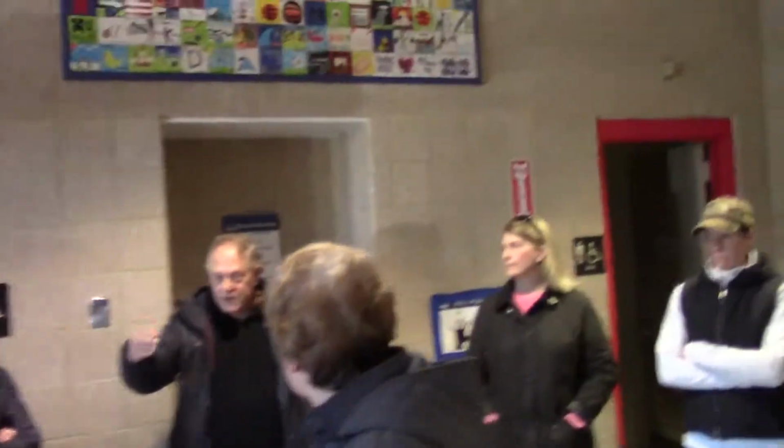10.38 is the central office roof because it's not used for instruction. We do have that grant commitment from the state in hand. The project's been bid, and it's supposed to start April 1st. Right, I know we were waiting for the audit to be completed before we could move forward on that, which was part of the delay.